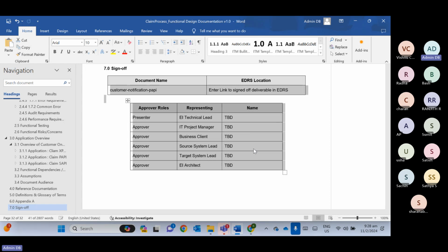If you need to do a small change, you can put 3 story points. If you need to do a big change, then 5 story points. Then if you have new development, like simple API development, 3 story points. If it is medium complex, 5 story points. If it is very complex, then 8 story points.